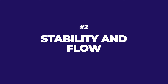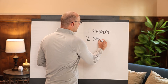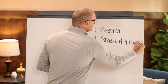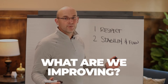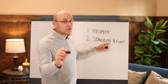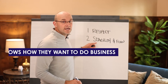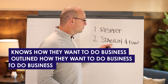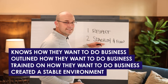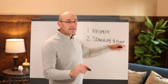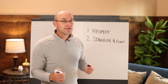Principle number two is stability and flow. I love this concept, and it goes back to the question I asked: what are we improving? Well, if you are improving a stable environment — meaning the company or the project site knows how they want to do business, has outlined it, trained on it, and created a stable environment that flows with a takt production system — then that is an environment that you can improve.